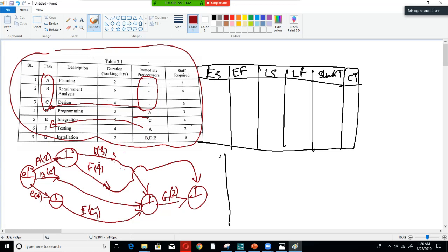Now let us fill up the blanks in each state. So from 0 we are taking 2 in this direction, so it will have 2, and after 2, if we take the D path, we get here 5, but there are 3 paths going through this state, so we have to take the maximum one, so we'll wait for the other values.